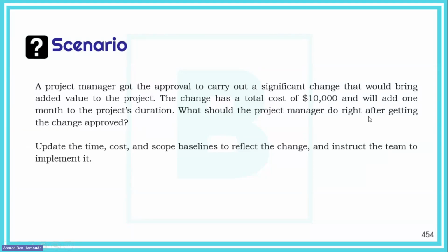Okay, so what should the project manager do right after getting the change approved? Here, we've put update the baselines, the time, cost, and scope baselines to reflect the change and work with the team on implementing it. Okay, of course, again, as I said, this was a question. Of course, the questions in the PMP exam, they don't always list all the actions. They just list one action from the entire process, and each time in the PMP exam they can list just an action from the whole 8 steps of the change management process in the project in waterfall. And you need always to figure out, okay, now if the question asks me what to do next, then I need to figure out where am I exactly in the project.